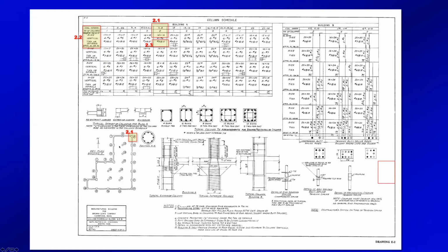I may add a question to this in the future. So 13 looks to me like a round column. It's out here in the middle, right? So we'd come up here to 13. It says it's a 20-inch round column. It's got 8 number 6s, and it's got 3/8 inch round rebar at 2 1/4 inch.